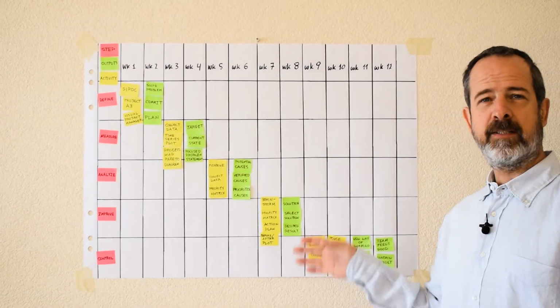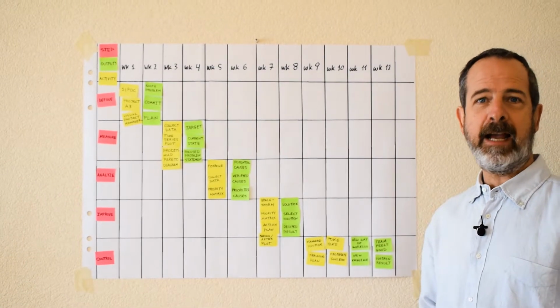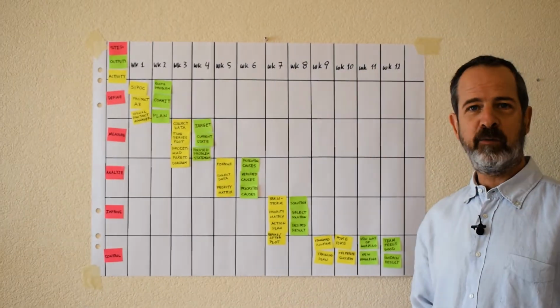Next step would be to discuss with the team the different actions you need to take and plan the resources necessary to fulfill it. Let the team members write each of the milestones and activities on the post-its. One activity equals one post-it. You write the output to be delivered, the person responsible, and the expected date of completion. Post-its have the advantage that you can easily move them around the paper plan as you map out your timeline.